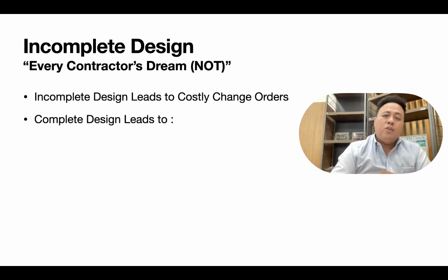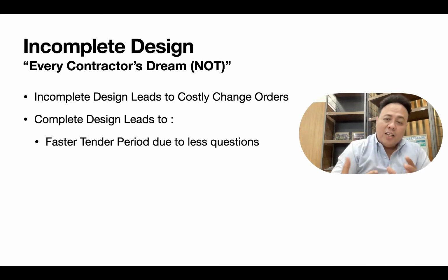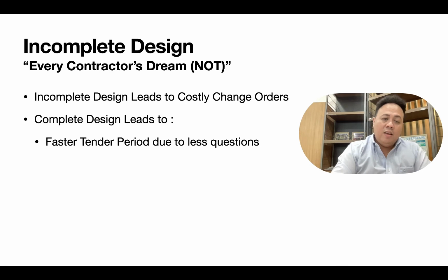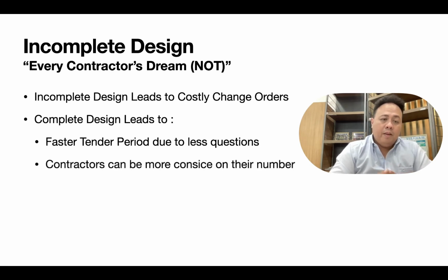If the design is complete, what does it lead to? If the design is complete, you will have a faster tender period due to fewer questions during the Q&A, right? You can finalize many things upfront. Contractors can be more concise on their numbers, meaning they can give you the most realistic number on their costing.